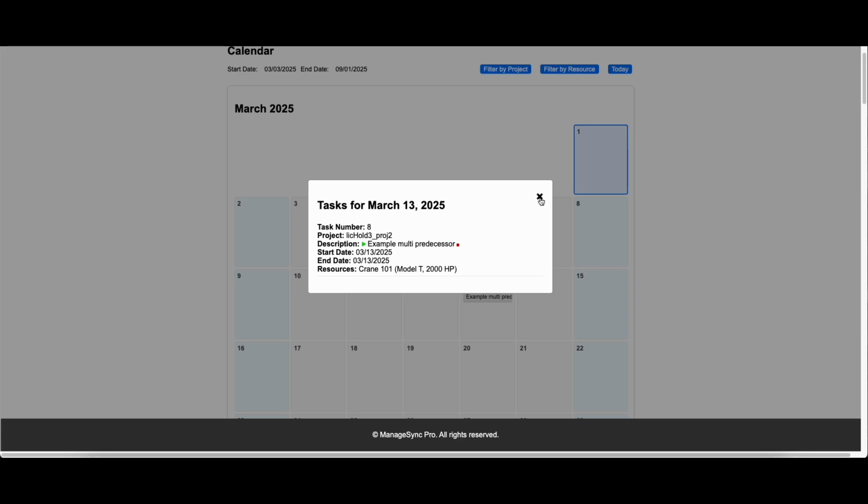Now that becomes useful if you've got limited resources. Look, for example, you have only a certain number of a piece of equipment, and you need to use it on 17 different projects, and each of them are using that equipment at different times. And you need to make sure that that piece of equipment is not being overutilized or scheduled 5 times to be used in one day. Whenever it can only be used once in one day, those types of things.